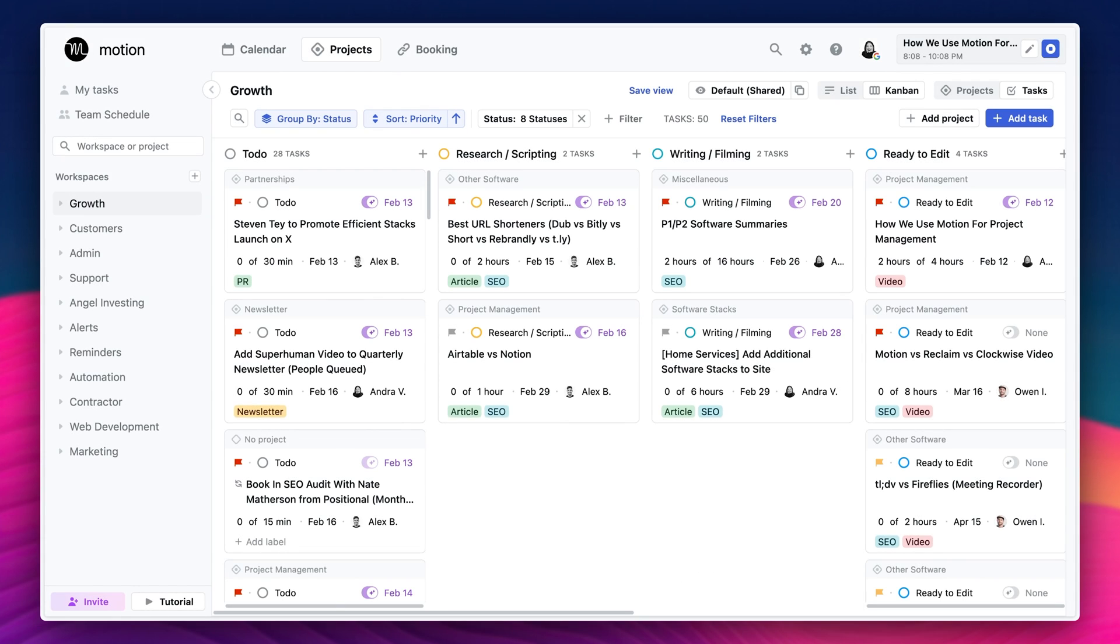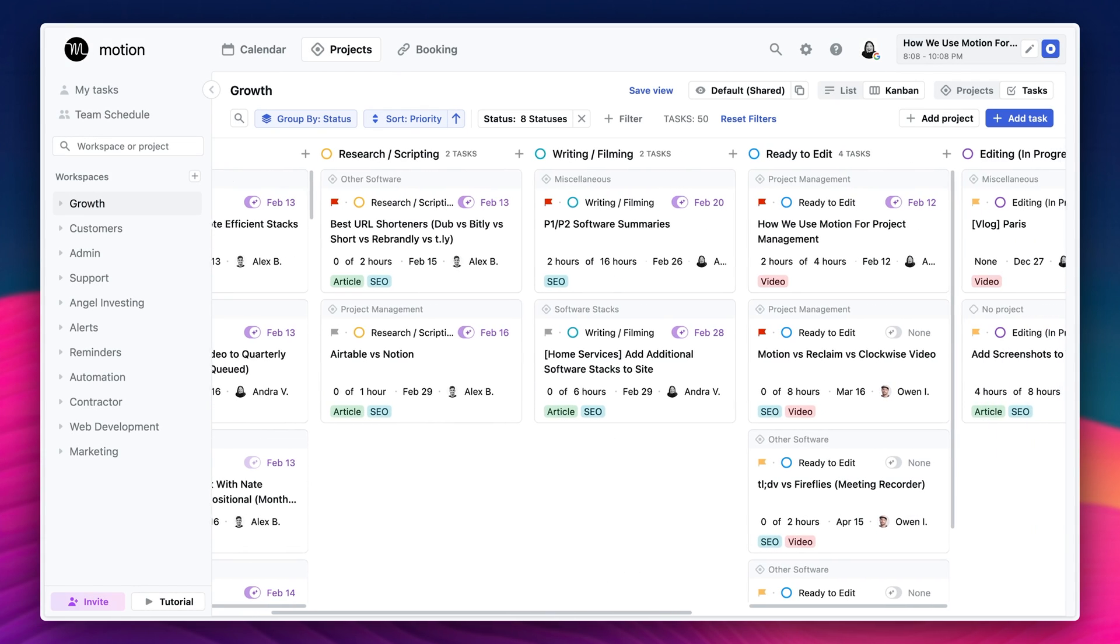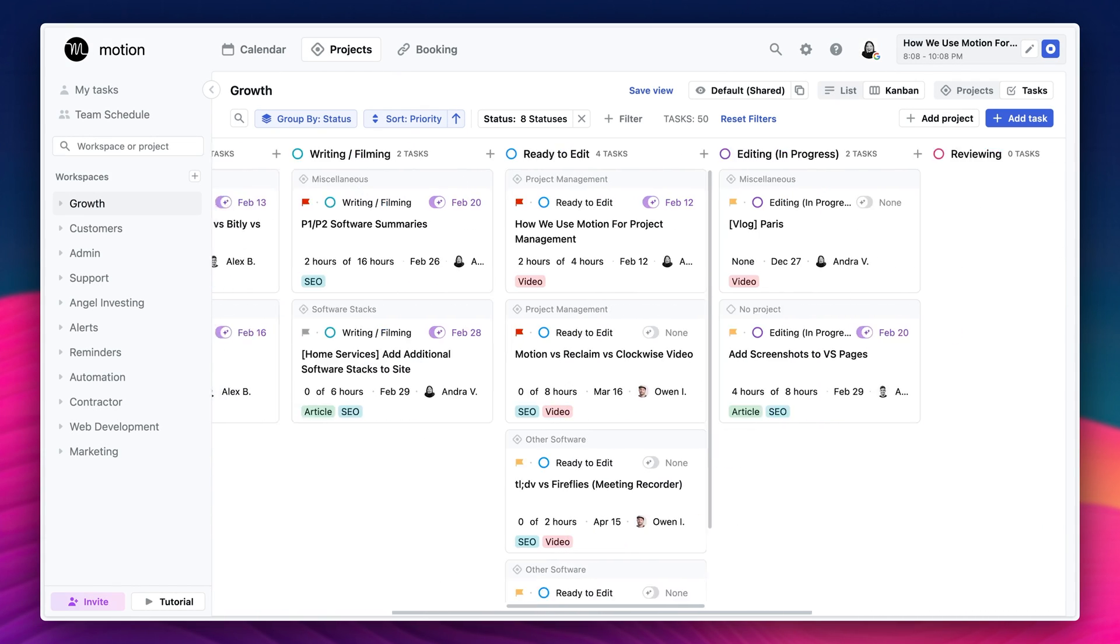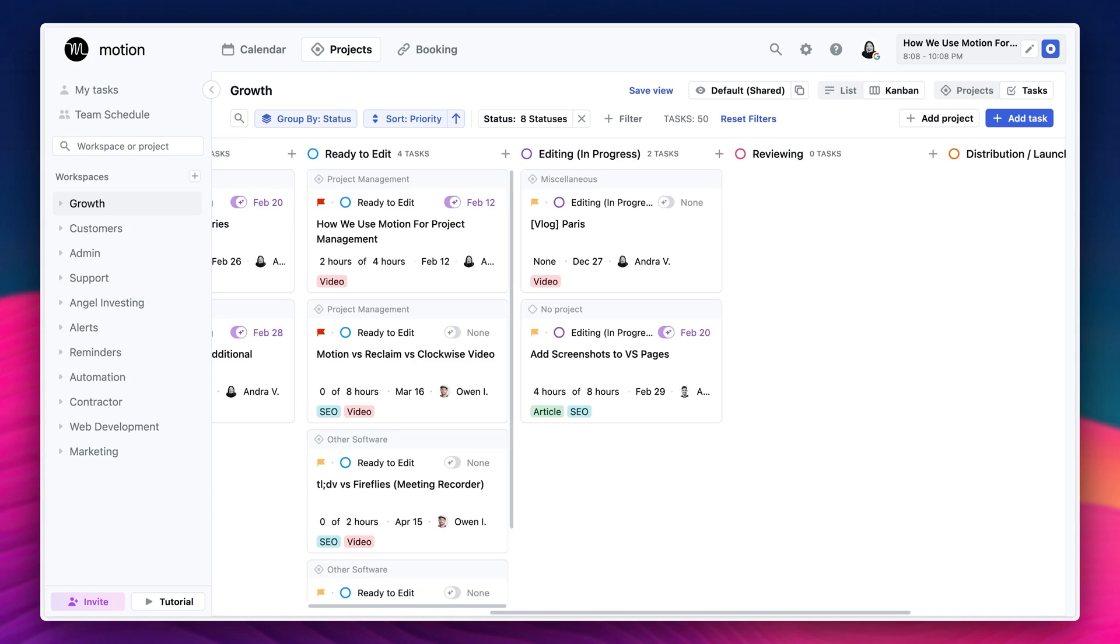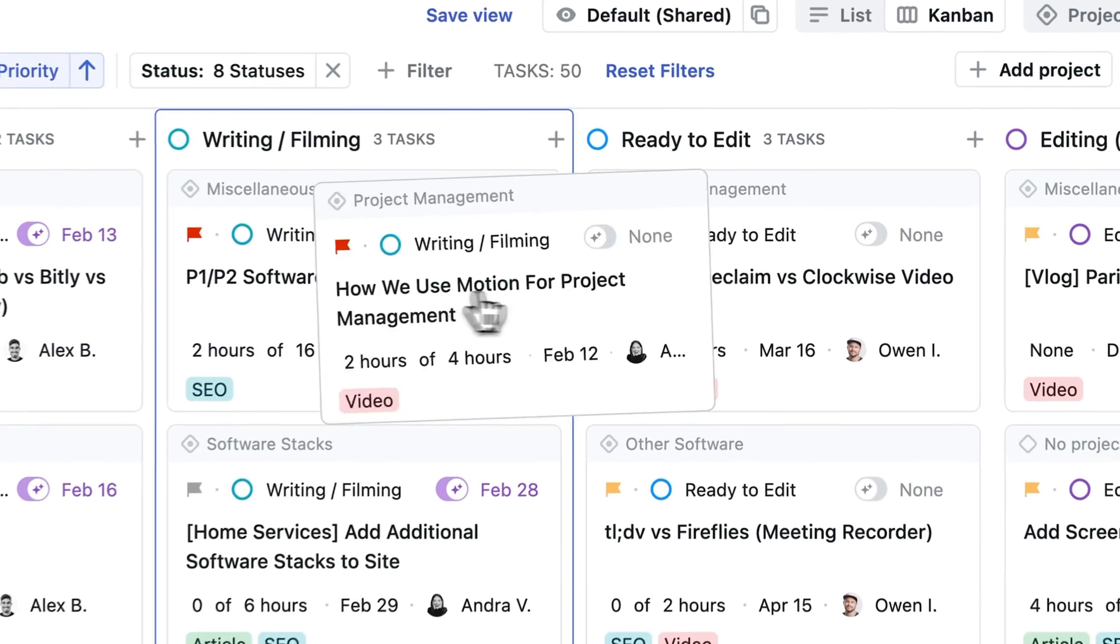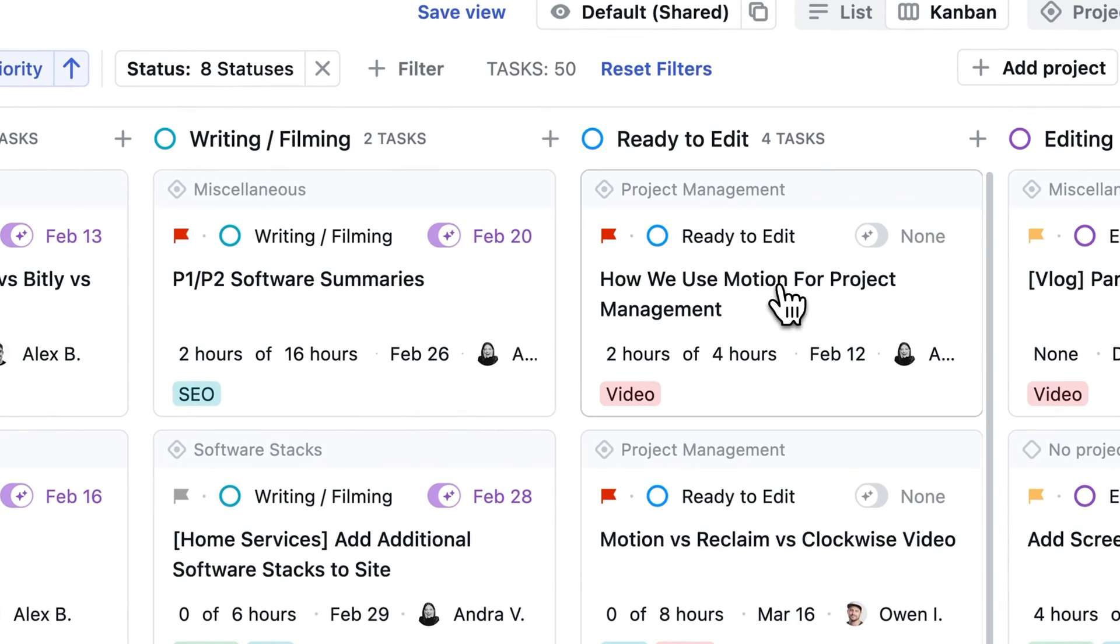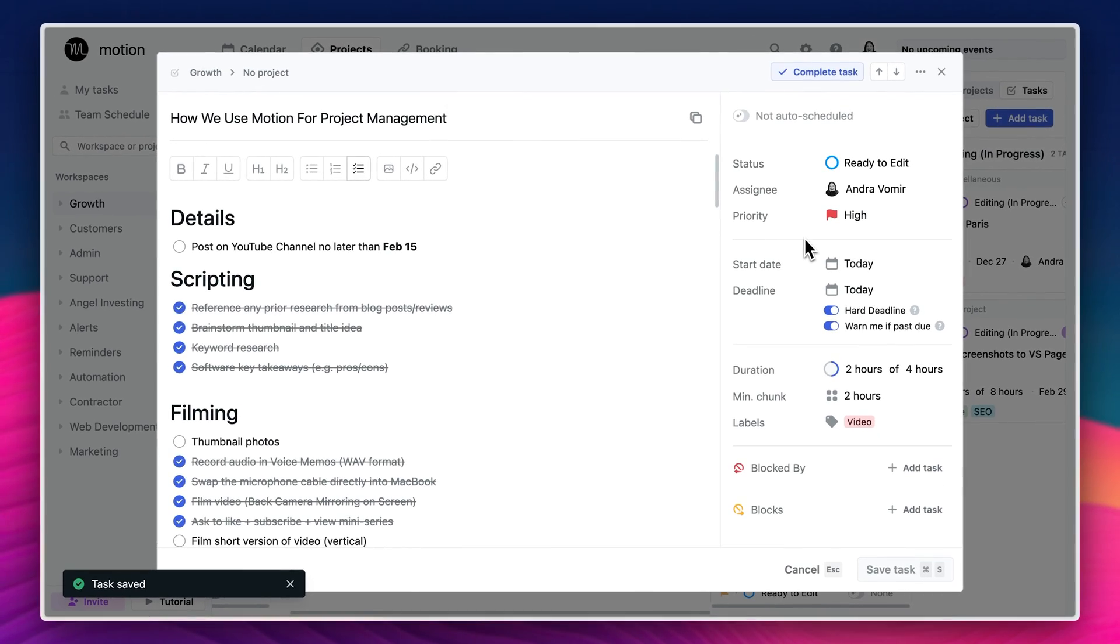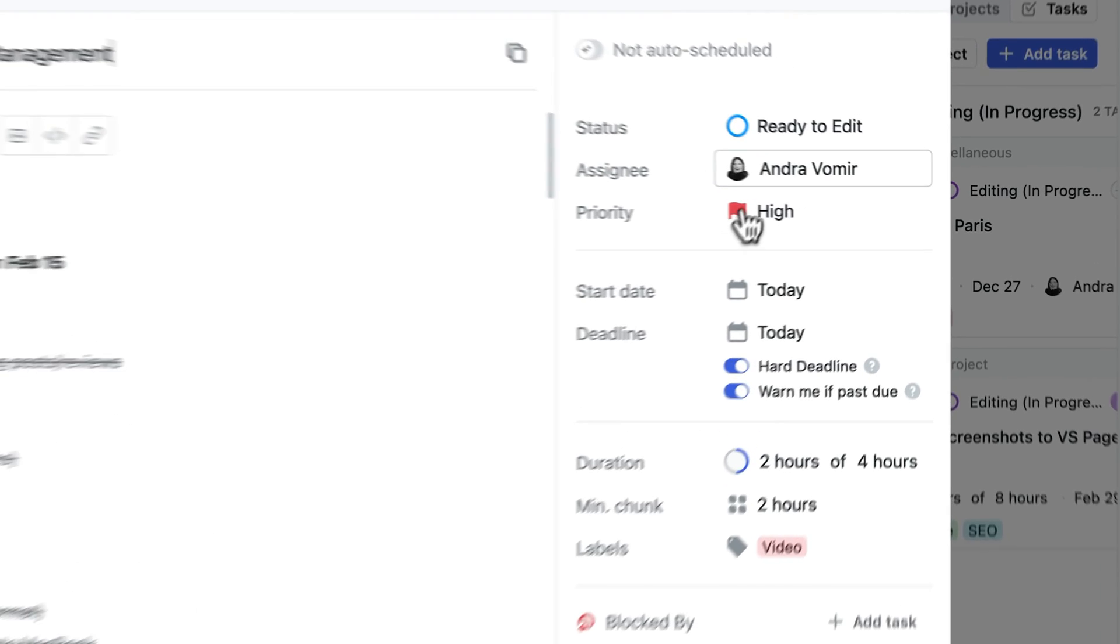Statuses can also represent different team members that are responsible for different parts of the project and moving it forward. But we're going to tell you more about flows when we get to the Figma files. For instance, while I'm mainly responsible for writing and scripting videos and filming, once I have all the footage ready, I'm going to move that task over to the next status, which is ready to edit.